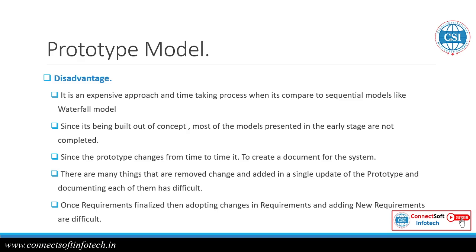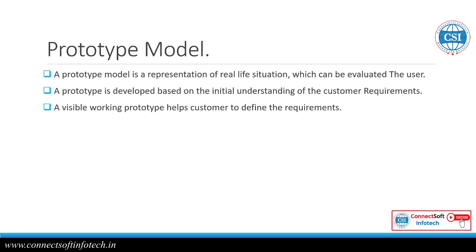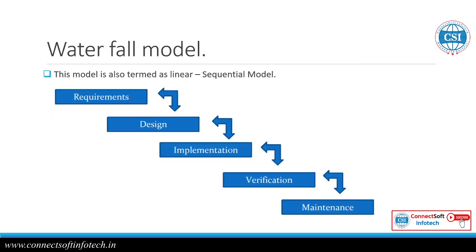Okay, but you should have to know this SDLC process. Okay, that models. So we have seen up to here the waterfall model. Okay, that is the traditional model. Once one phase is completed, requirement analysis completed, then designing completed, then coding completed, then testing. Okay, and we cannot jump from one to another. We need to follow the stages. We complete the first step, then we go for the next stage, and this is suitable for the